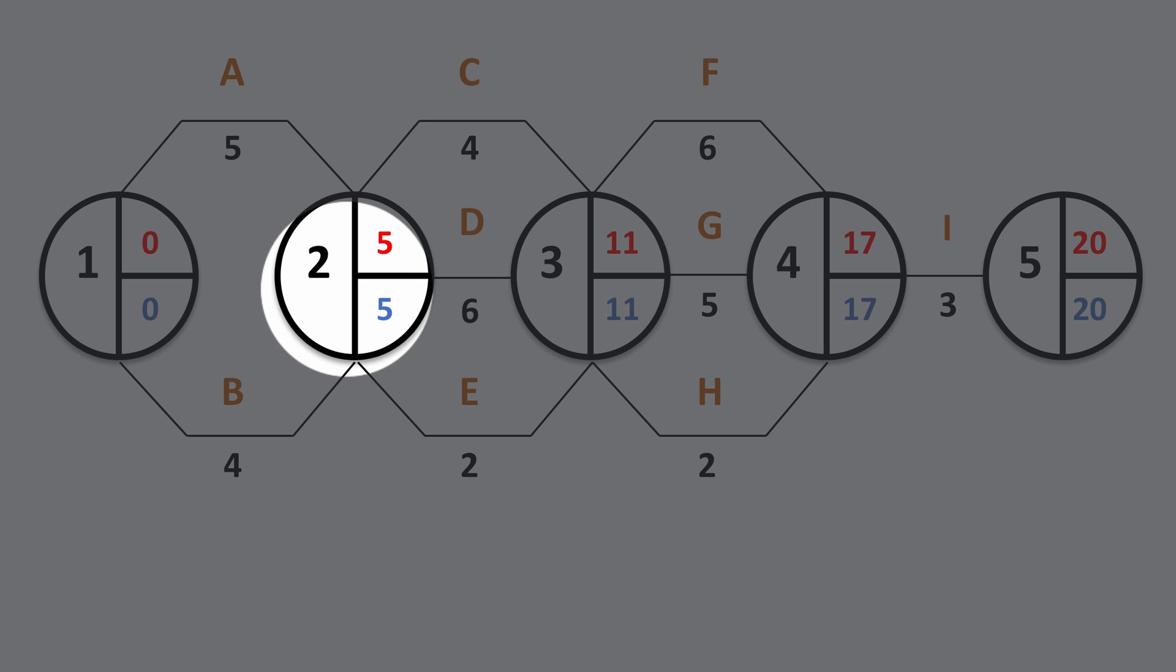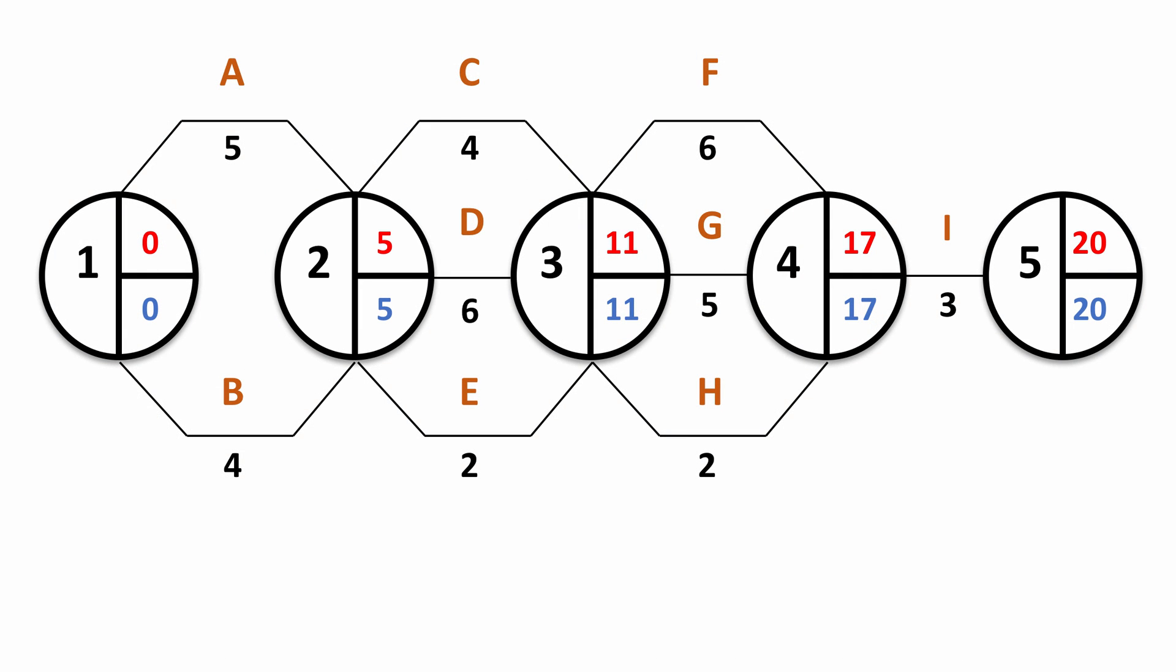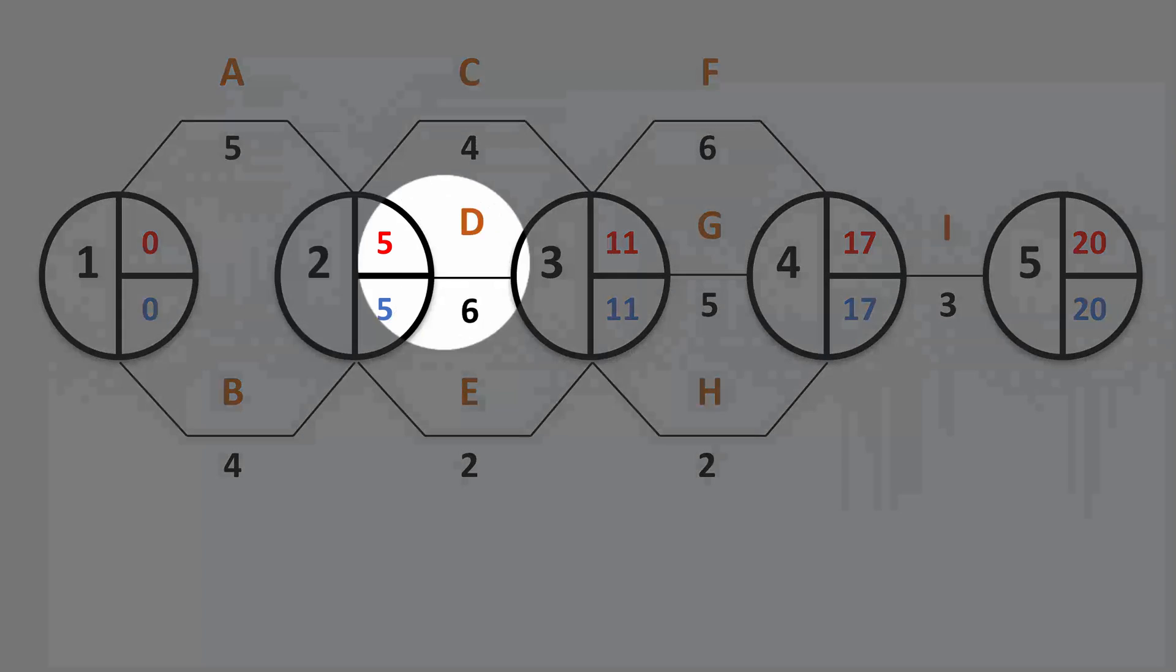C, D and E are the same, no change there. So we can't start F, G and H until those three have been finished. So therefore it must be five plus the longest activity, which is six. Five plus six is 11. The earliest start time for F, G and H is 11.